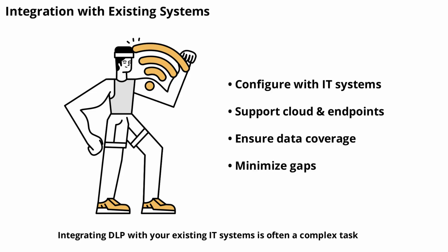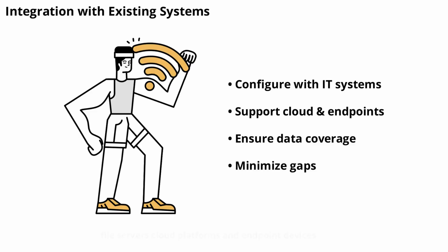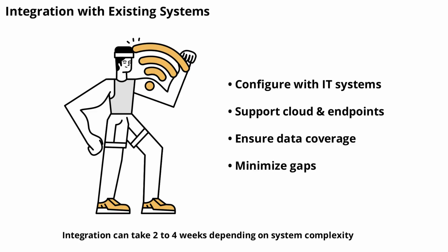Integrating DLP with your existing IT systems is often a complex task. This phase involves configuring DLP tools to work with email, file servers, cloud platforms, and endpoint devices. Integration can take 2 to 4 weeks, depending on system complexity. Proper integration ensures comprehensive data protection across your organization.